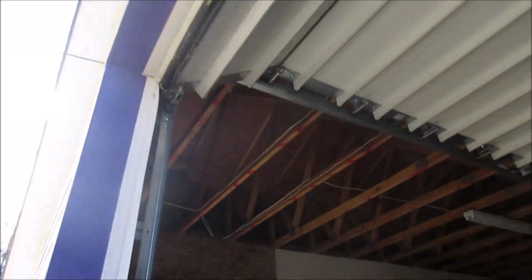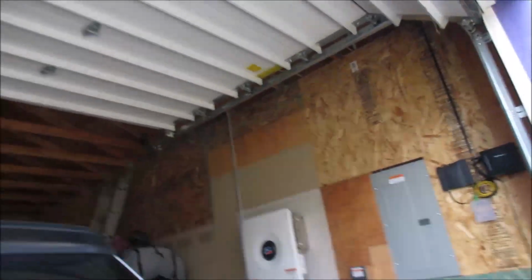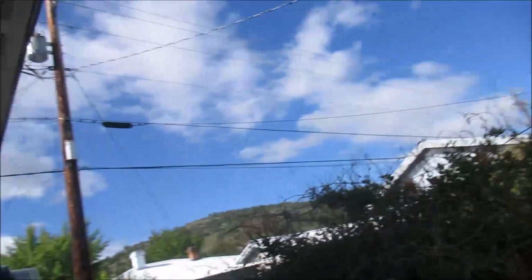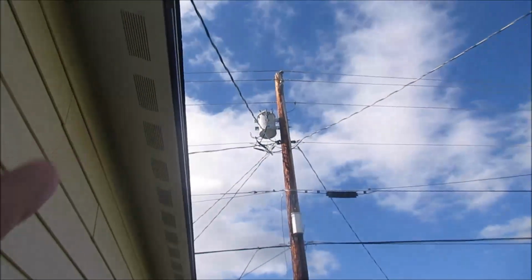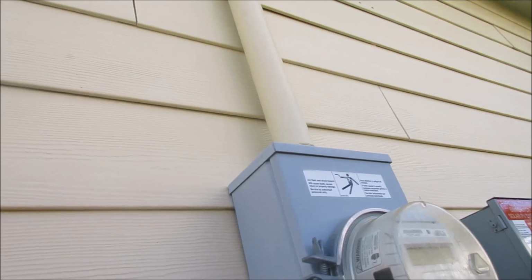We've had an electrical and material inspection to make sure that there is no risk of collapse of the roof, that all the conduit is properly set up, everything is wired successfully. And then finally, the local utility will come out and replace a panel inside this box. It's been reprogrammed so that it will count electron flow either off the grid or onto the grid. Meanwhile, we will supplement to about 30 amps at 220 to about 6,000 watts.